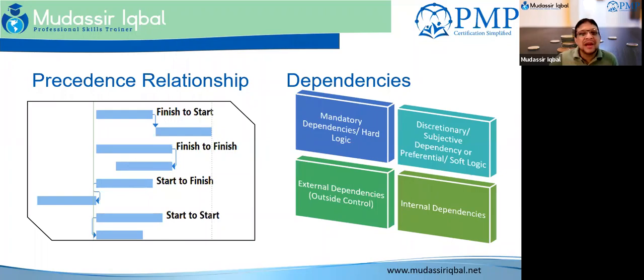Even then, it might lose some of its freshness, it might lose some of its color, and it can get destroyed during the painting. So yes, I would like to maintain that relationship as part of being the best practice. But if the project comes to a point where, we will see in the later slides, I have to actually gain some time, I could do that. Nobody's going to stop me. My risk gets higher.